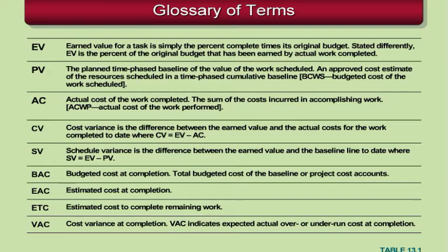So those are the three parameters, and notice that we're getting those three from three different sources. The earned value is coming from a report out in the field or through some earned value set of rules based on the percent of the work that's been completed on an activity. The planned value is off your baseline budget, and it's based on where you're at in time in the plan. And then your actual cost is what's been billed to the account numbers through your accounting and financial system, really coming from a third independent source.